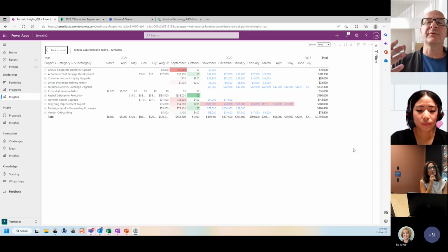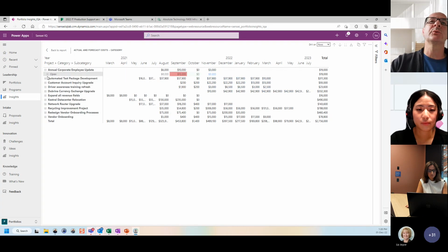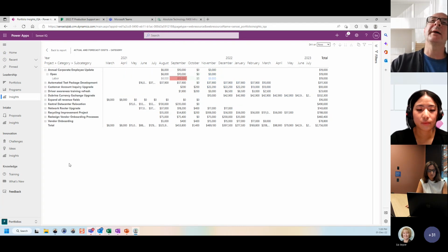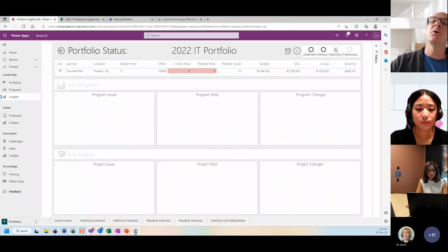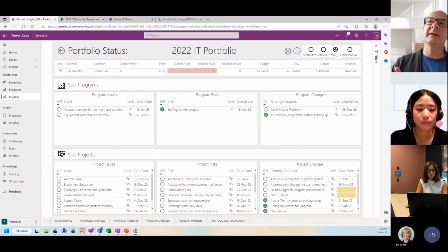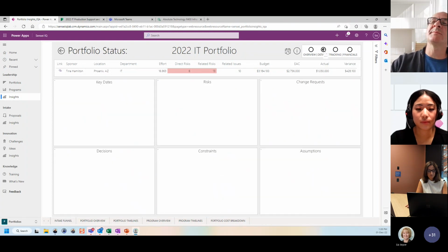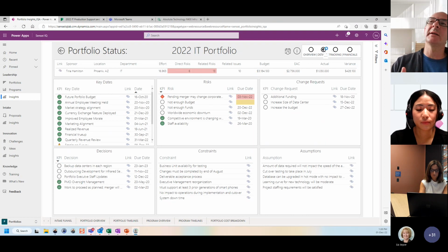And just like we did that with projects, I now have the ability to identify that across all of my projects in the portfolio, and I can easily see where I have an over and underspend, and could of course drill that down into cost categories, CapEx, OpEx, and the individual cost item. Not just financials, of course, that incorporates all of the important information that I need. Issues, risks, change requests, and where they are, not to mention that you can, of course, manage portfolio related information as well and have them at one time overview.